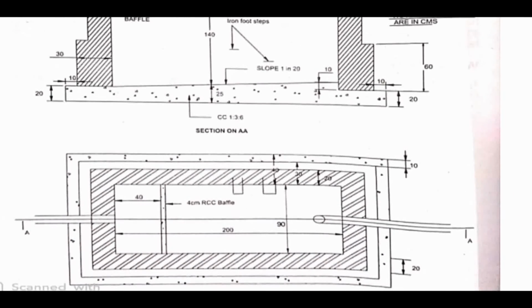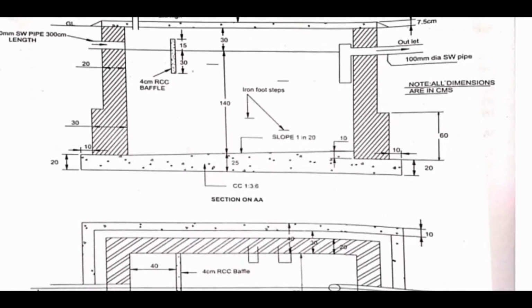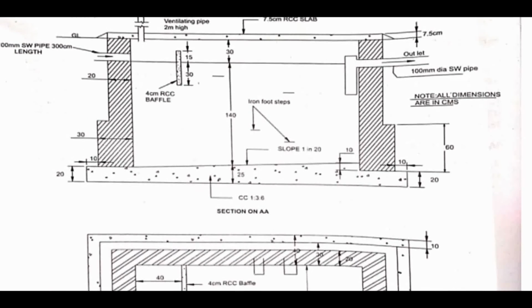Length is 200, and breadth, if you take from outside to outside, then you are going to get the whole dimension of the roof covering slab, right? So from where to where you have to consider? Here you can see in this diagram, the hatched portion, the stepped wall, the first wall. To the end of that first wall they had taken the slab, right?